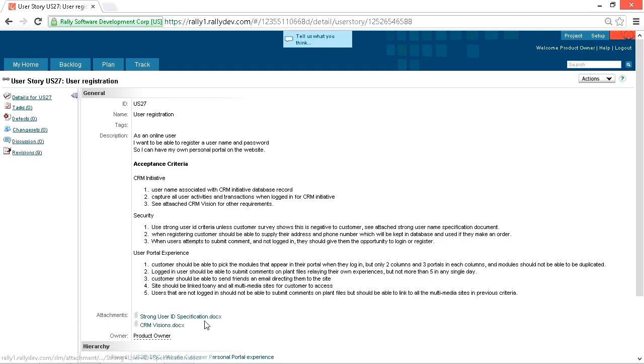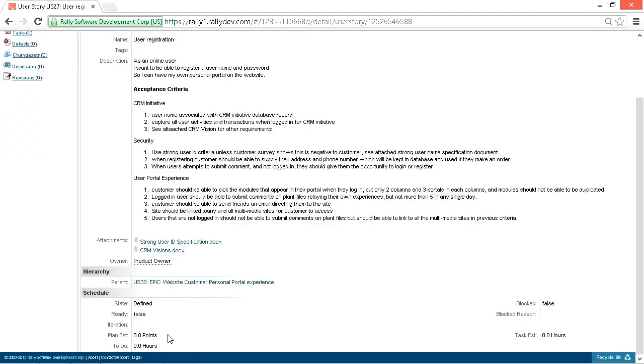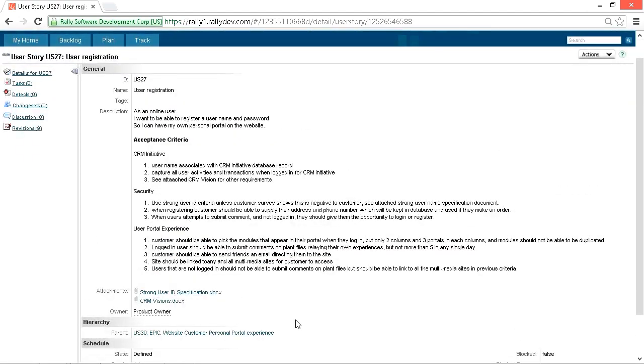And also there's the CRM vision doc. Well, that's way too high level for the team to really understand what's required there. That's just a vision. So you can tell the team had a really hard time estimating this because they ended up with eight story points.